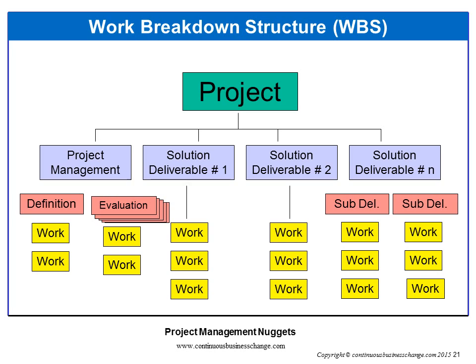In order to ensure it's manageable, we strongly suggest keeping your WBS to 3 levels: deliverables, subdeliverables, and tasks or work packages. There is a video in the project plan guide that describes in detail how to create the WBS.